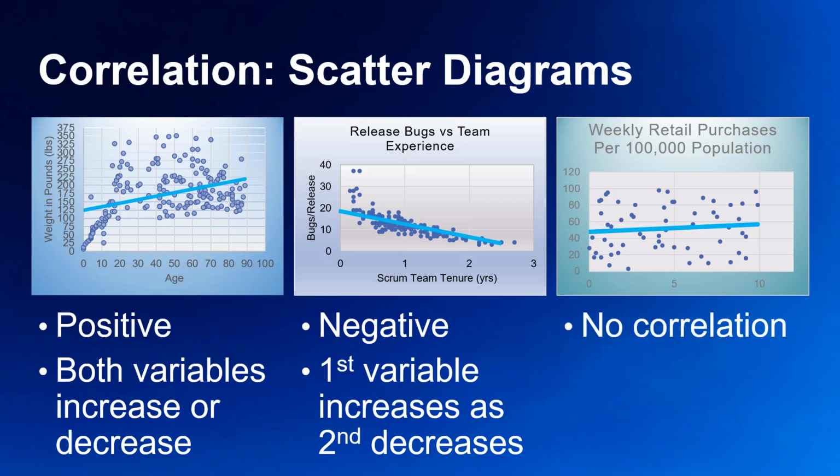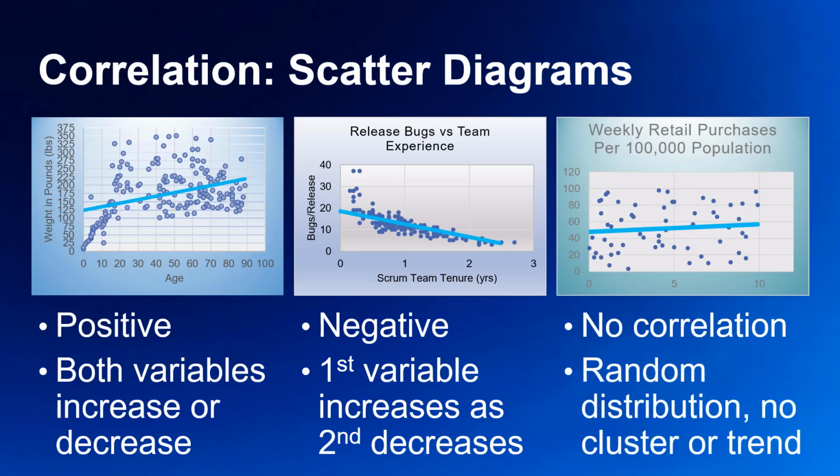In this scatter diagram here, all the values are quite randomly distributed with no clusters. In this case, we find the trend line almost completely horizontal. In other cases, we may find the trend line fully vertical for lack of any pattern to mark a trend. When we do not find any correlation, we need to measure a more significant factor. In the managed quality process, we may use scatter diagrams to determine what measurable relationships exist, if any, between any elements of a process, environment, or activity on one axis and a quality defect on the other axis.